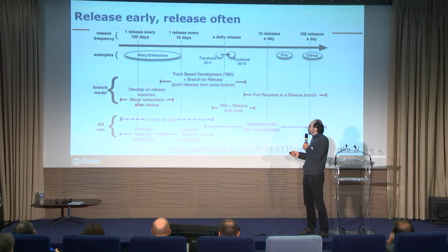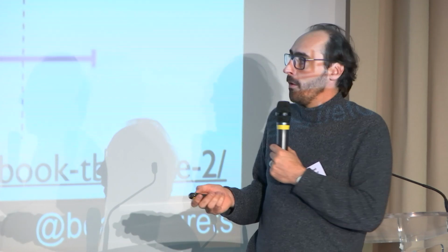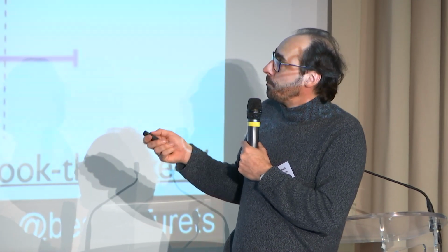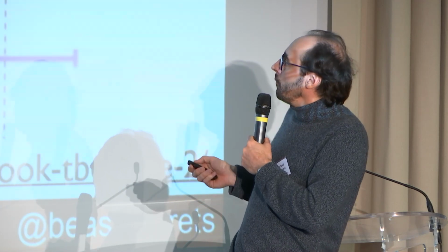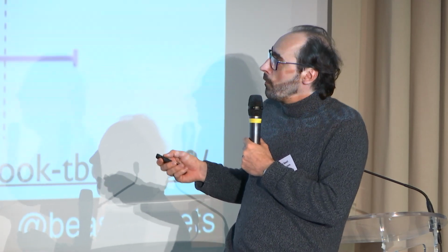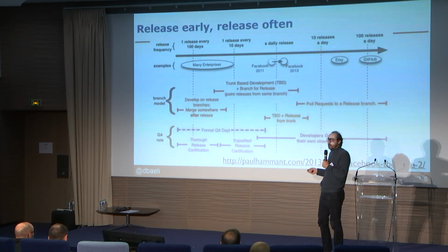But if you want to improve your lead time for the features, because the lead time for the features here is more around 3 months or less, and you want to go to 10 days, 1 day, or many times a day, you have to shape your code base differently to accept releases every day. And moreover, you can't retest everything. So you have to somehow get rid of the QE department.